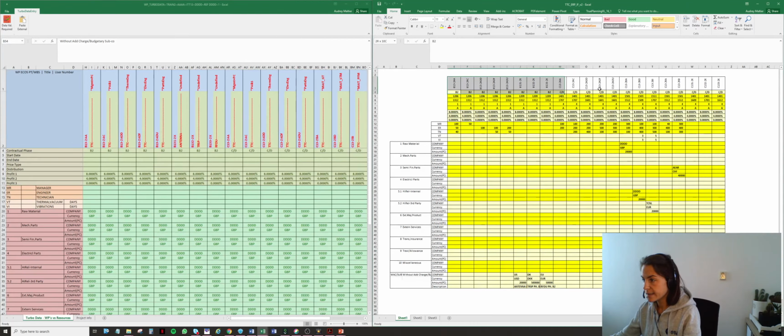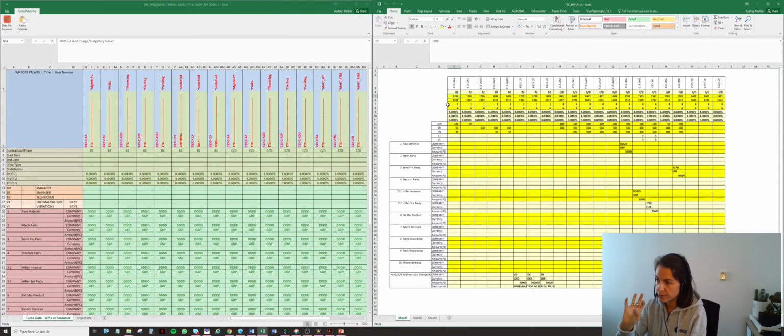So basically, this is your first line here where you have the phases, and here are already the dates pre-filled in. So very important, you really have to follow this format for Excel to perform the verifications and be able to import properly the information in ECOS. So in the case of the Excel file, there is no tilde between the year and the month. So if you want to enter June 2012, you have to enter 1206 altogether.